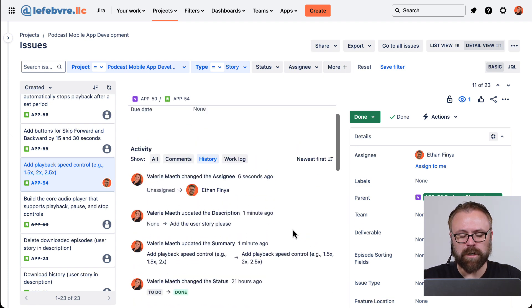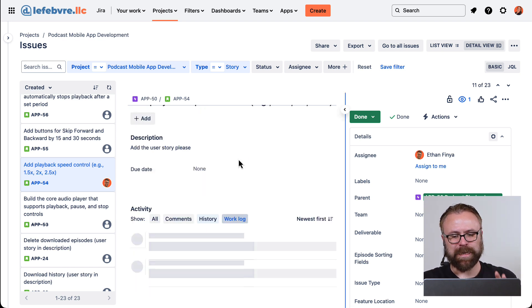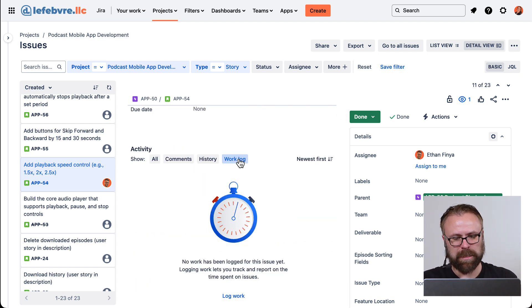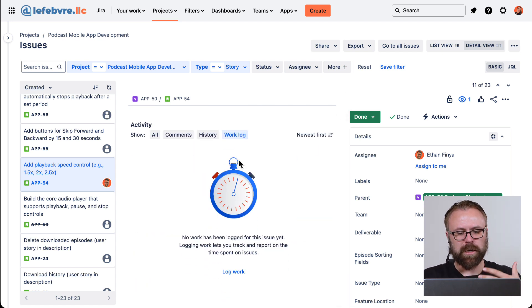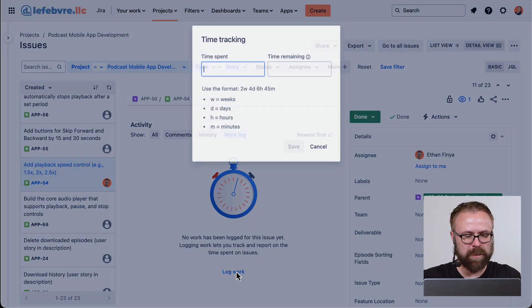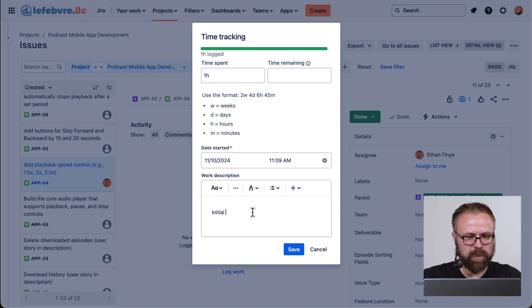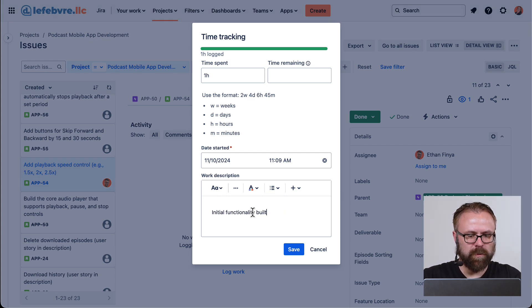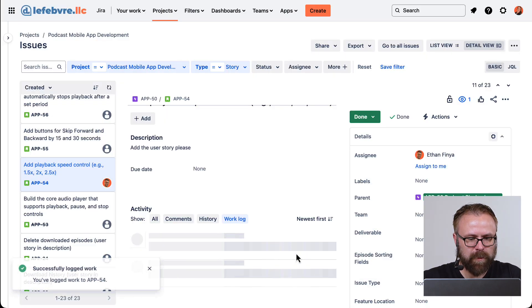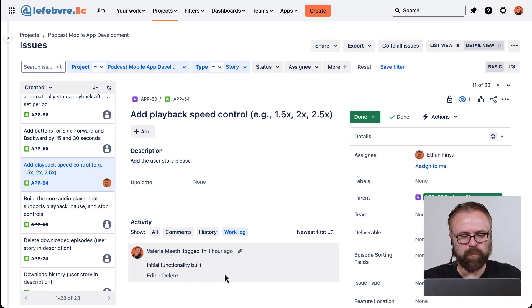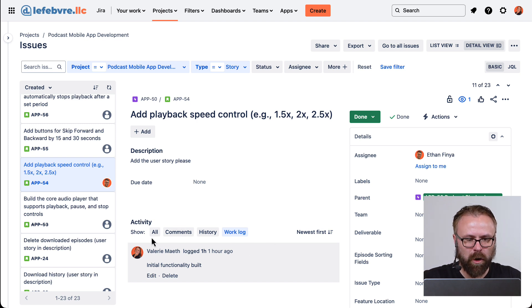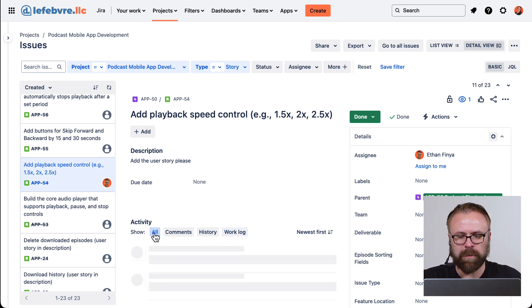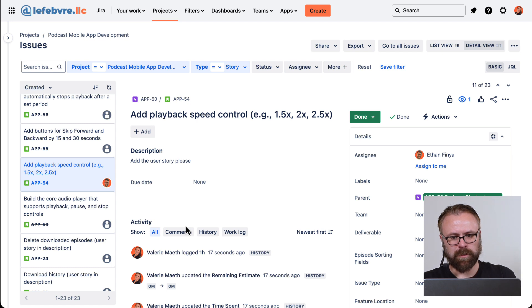We can also see the work log. So by default, there's not automatic time tracking in Jira, but any user can add the time that they've worked on the issue to show up here. So if we want to say, maybe we spent an hour building the initial functionality, and we can see that show up here. So now that we know what these three are, this all activity makes a lot more sense. It's basically these three activity items in one log.